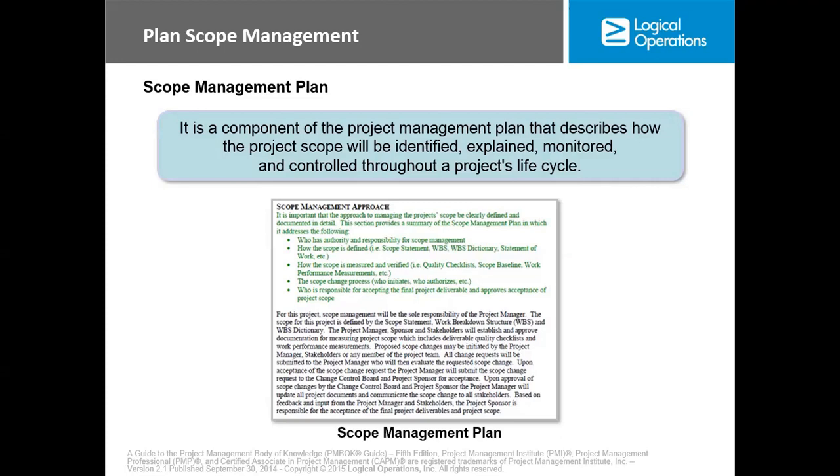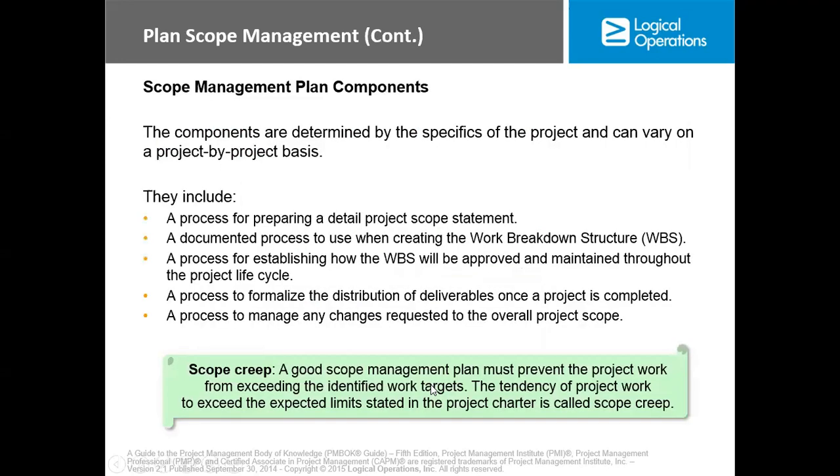Now, once the project has been scoped or baselined, you cannot add on that scope except it goes through a standard change management system. Okay, so these three things make up the scope of a project. So we start with the scope management plan, the scope statement rather. So this is an example of the scope management plan, how it looks like. Okay, let me continue.